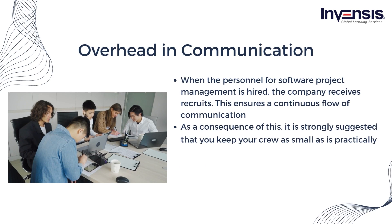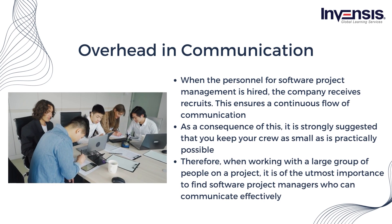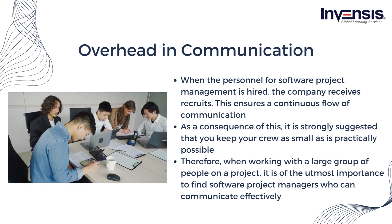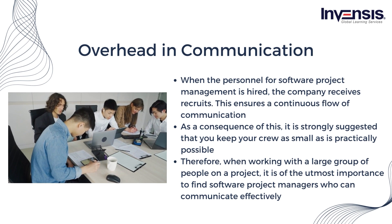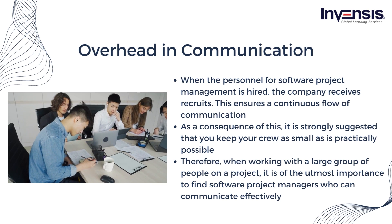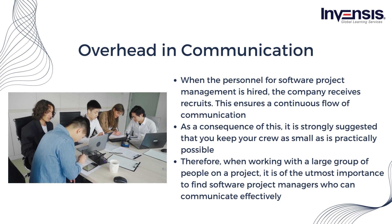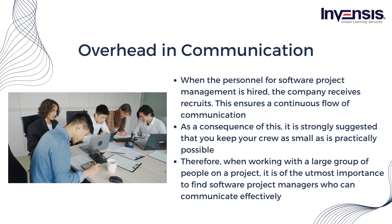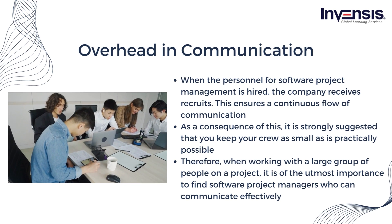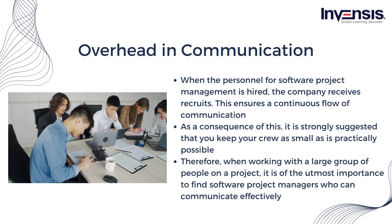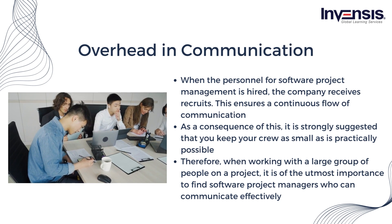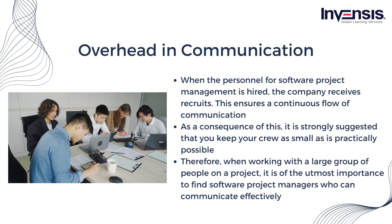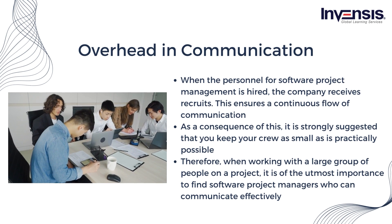The third effect is overhead in communication. When the personnel for software project management is hired, the company receives recruits, which ensures a continuous flow of communication that may or may not be compatible with an organization's culture. It is strongly suggested that you keep your crew as small as is practically possible. When a team is large enough, the overhead associated with communication tends to increase. Therefore, when working with a large group, it is of the utmost importance to find software project managers who can communicate effectively with a wide range of individuals.